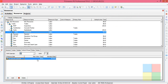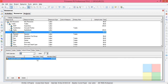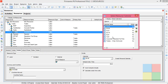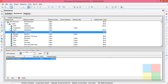When you select 5 Day 8 Hour and come to Units and Prices, the Maximum Units Per Time — meaning per day, how many hours this engineer is available — since the calendar is 8 hours per day, it automatically shows 8 hours per day. Suppose the project calendar was 5 Day 9 Hour; even then the calendar we choose will be 5 Day 9 Hour. If we go with 5 Day 9 Hour, see the changes — it automatically comes to 9 hours per day.